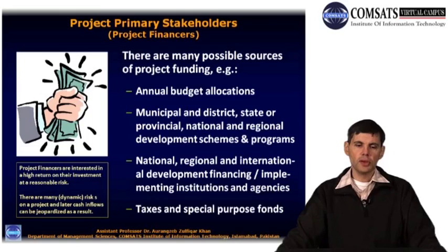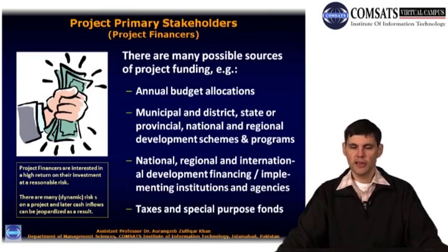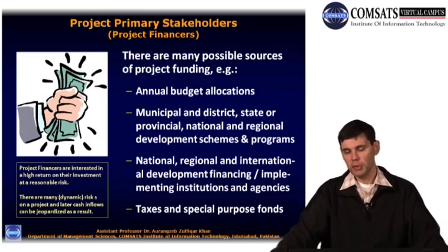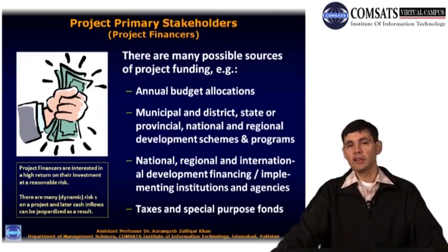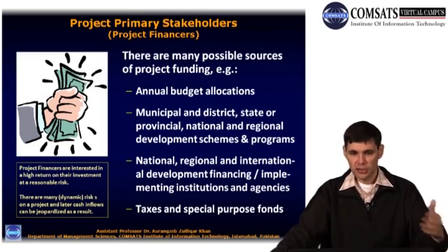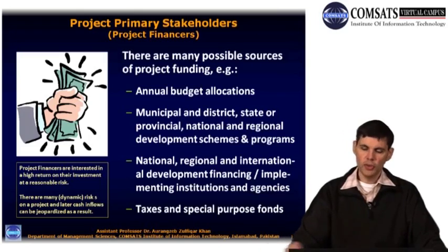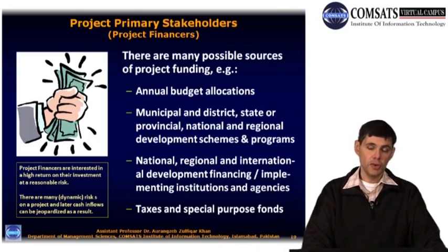The financiers were the Austrians, Swiss and Germans, if I'm correct, and because of the immense pressure on these institutions not to provide funding, which I think was quite right, it was quite right of stakeholders to oppose that project, they actually blocked the funding, and the Turks had to then look around for different sources of funding. This is a direct example of how stakeholder pressure in this case can influence the funding flows.